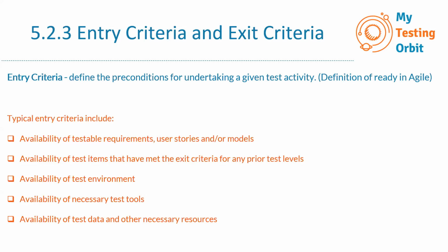And the last one is availability of test data and other necessary resources. When you are designing test cases, of course, you will also prepare test data. But if you don't know what kind of test data you will require to prepare or condition, or what kind of resources you need, and if those resources are not there, then this will be one of the preconditions as an entry criteria, because you can't begin your testing without it.